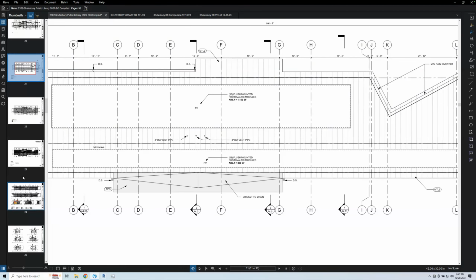But don't the architects owe us a project that meets the budget? I'm asking the OPM. Yes, and right now we're over budget by a few $100,000. So I think the architects have to come up with some better VE items than these to get us a couple $100,000 worth of savings, and I'm not seeing any place to get it other than the eave and these entrances.